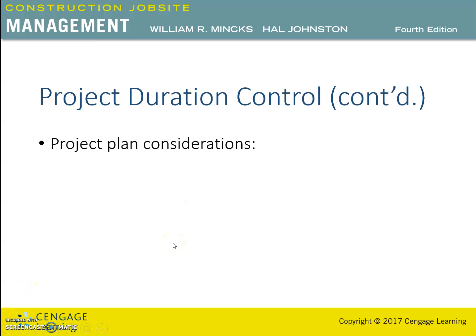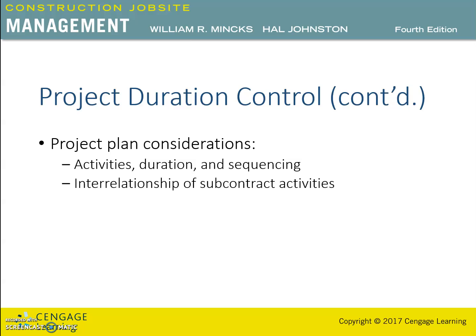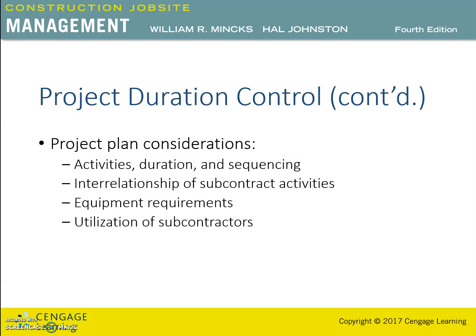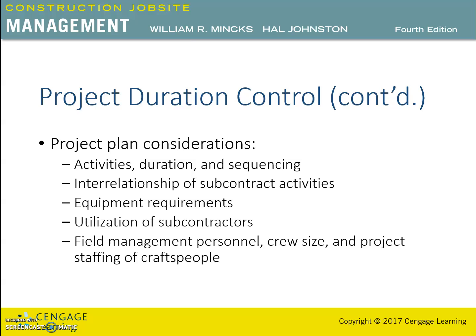The project plan involves more than just a schedule of activities. It must consider all project needs and how the solutions to those needs affect the duration of activities and the project itself. Some planning considerations include the following: activities on the project, duration of the activities, sequencing of the activities, the interrelationship of subcontract activities, the equipment requirements for the project, utilization of subcontractors, field management personnel, crew size and project staffing of craftspeople, and